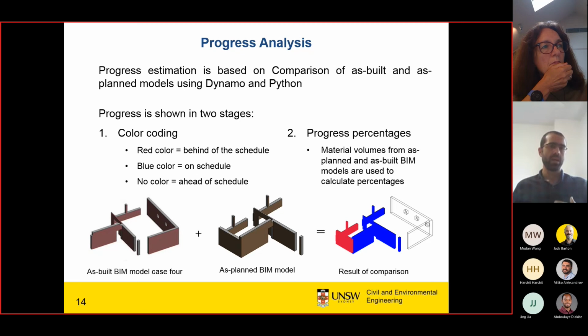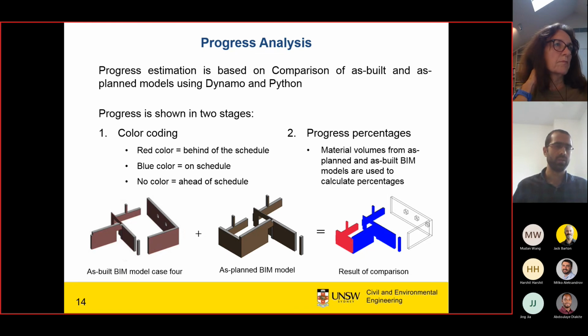If we have work ahead of the schedule and we don't have the material for it, then there will be a delay on the work. And the same, if there is a delay on the construction site and we have additional material, that will not help on the construction site. So a different issue will happen. So we will look also at resource allocation, and at the other aspects, as you mentioned.